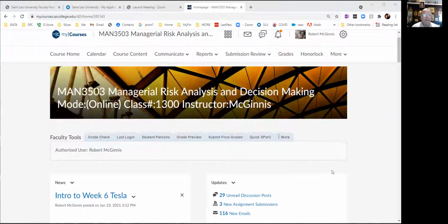No, you have to do both, because you have to have that information to put in a plan, because you're going to have risk treatments. So the first steps would be the risk profile, the risk map, then the fishbone diagram. And on the fishbone, you'll have 5 or 6 generalized areas. If you just want to take one and drill it down to a level and just focus on those treatments, that's fine.